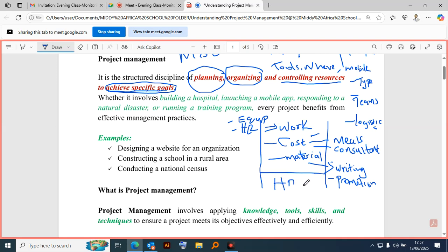Each and every budget has a budget line. Like if you are dealing with construction, and you have exhausted the budget line for construction, you cannot go and exhaust the budget line for human resource. When you use another budget line for other activities, during auditing it will be a problem. So it is a part of controlling the resources during auditing.